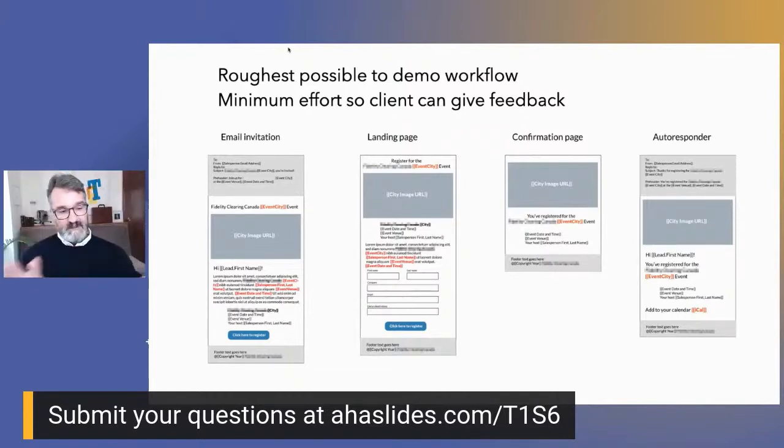So as we do the wireframe, it's very easy to find things that you can reuse and repurpose. And so that way it speeds up the automation process for the client. So I give them a chance to really dig deep into the functionality here. I have them work through the user experience before we spend time programming. Sometimes what we'll do, if we're live, is take sticky notes and tear things up and move things around and put things back and forth. But this will save you a lot of effort when you start to program.